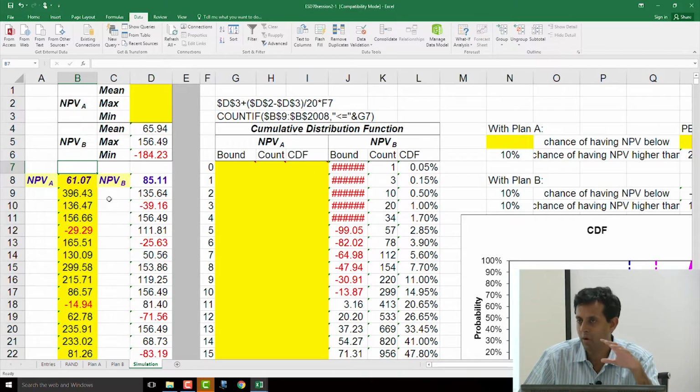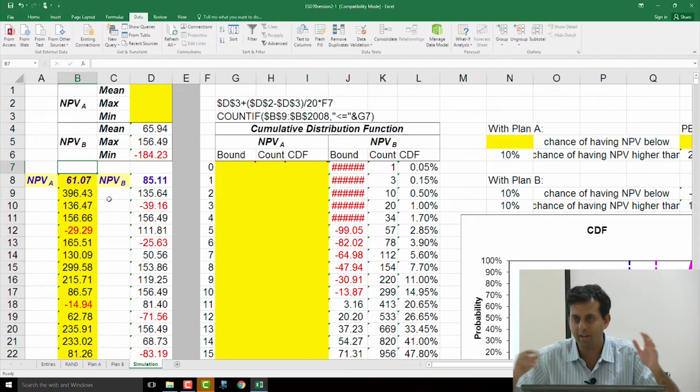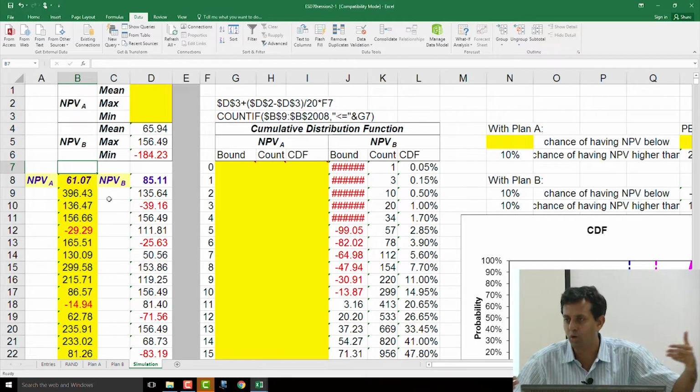So what we've done is slightly more sophisticated. We've said let's do some Monte Carlo modeling. Let's take demand and see that demand varies. At the moment it varies normally around a mean, and let us try to simulate and see, if there is some variation, what it would be. I've taken the demand as varying 50% around the mean. You can change that 50% value to 40%, 30%, so we can have all kinds of variances.